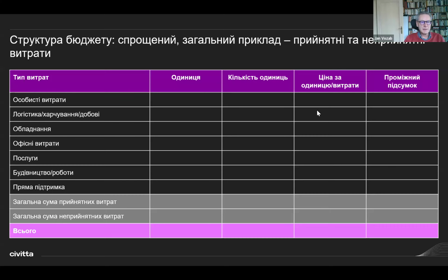And the reason for that is that by doing this you should prove to the donors, the assessors who assess your project, that you have included all the expenditures, notwithstanding whether they are eligible or not eligible, so that the outputs and results you promise to deliver are really achievable, attainable by the donor's money. So you should prove that you have got enough money to cover non-eligible expenditures should such kind of expenditures arise.